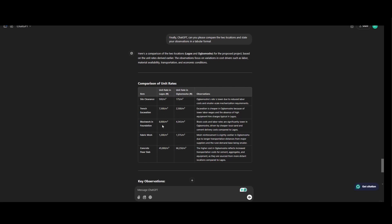Block work in Lagos 8,000 per meter square. In Ubumosho is 4,543 per meter square. The fabric mesh is 1,200 and in Ubumosho is 1,375. Concrete floor slab 45,000 per meter cube and in Ubumosho is 66,250 per meter cube.